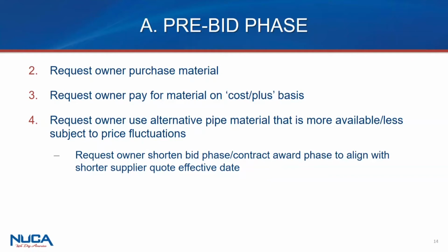pre-purchase of materials. So what's important to get is that the owners are educated, at least to some extent, of this, probably more so with DOTs than they potentially are in city county levels of government. But here the DOT in South Dakota is taking the lead in recommending to its staff that the DOT look at pre-purchasing the materials. And it's a way to put the cost properly on the owner and eliminate the risk associated with not only the cost going up later, but also potentially mitigating against delay, because if the owner's already purchased it, we eliminate the delay or potential problem of trying to get it later on in the project.